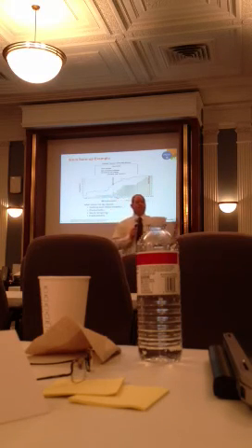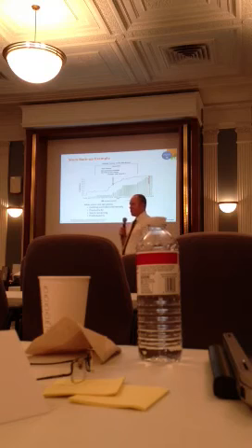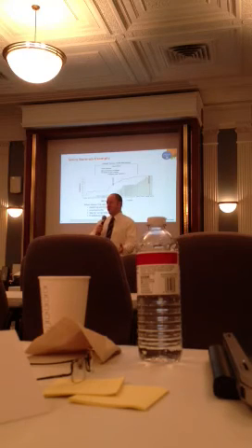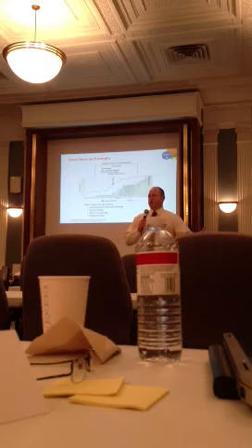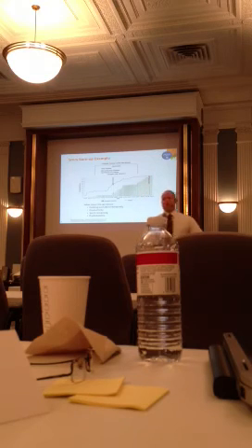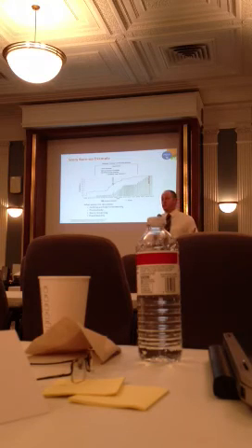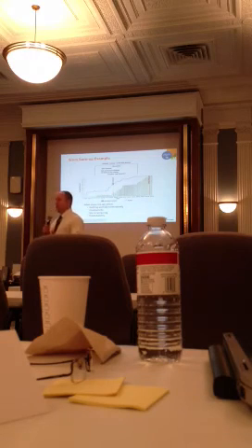So if you need to configure your environment, if you need to get tools, if you need to make sure everybody understands the user stories, or make sure that user stories are well formed, or whatever it is you need to do so that when you get to the first iteration, you can actually start working and doing stuff, that's your iteration 0 period. And I don't necessarily care how long your iteration 0 period is. It doesn't need to be as long or as short as your other iterations. Ideally, it's as short as possible, right? You want to reduce that time because it's overhead and just whatever it takes to get started, right?